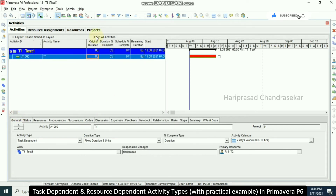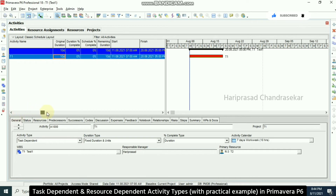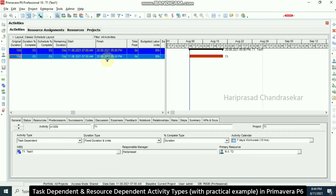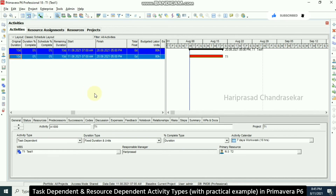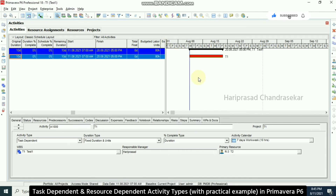Now we can see that the original duration automatically became 8 days, so I'll change it back to 10 days. Now the dates show the 11th to the 20th — starts on 11, ends on 20 — which is the correct result. If there's any error in the calendar it will reflect into the project, which is a big headache on large projects. Always check your calendar settings when dealing with any projects.